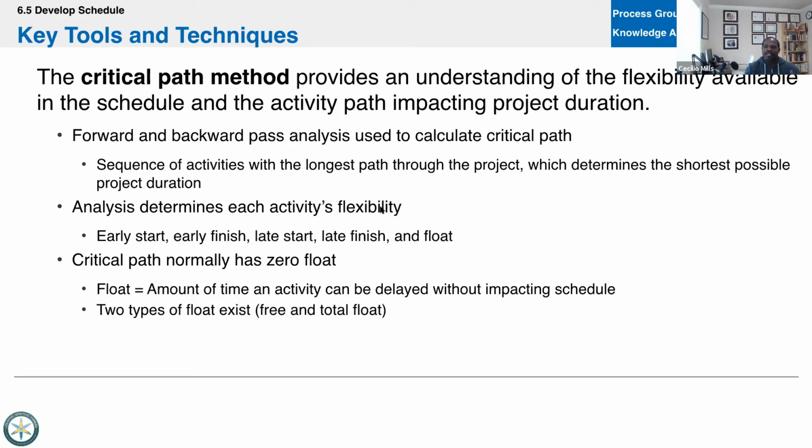So they've reserved a number of days for you to use due to weather. They've looked at the historical weather patterns, did analysis, probability, impact, and said 17 days is likely what could happen. And so they allow you to build that into the schedule. That's a reserve. We could call that a buffer only if they build it into the schedule. If that 17 days is added to the schedule, so the final product is 17 days later, then that's what happens. We padded or we buffered the schedule.